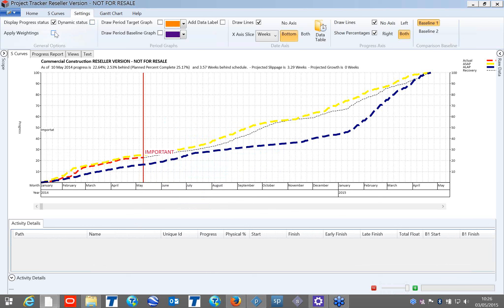For Primavera users, regarding weightings: in Primavera we create one user-defined field called 'weightings.' You can assign your weightings, and your S-curve will be based on that weightage. This is useful because in Primavera you would otherwise need to assign cost or resources to get your weightage curves.